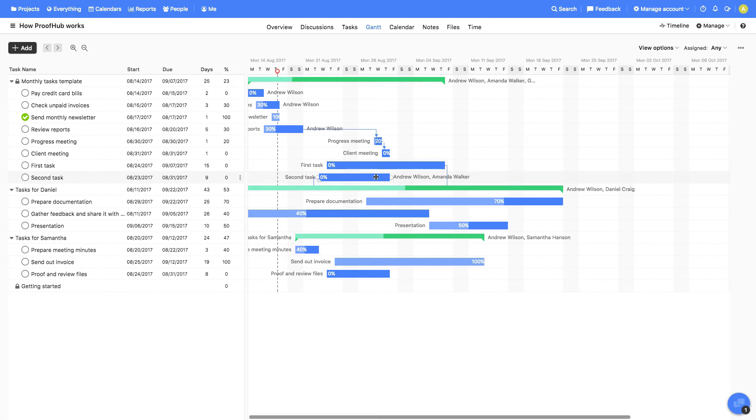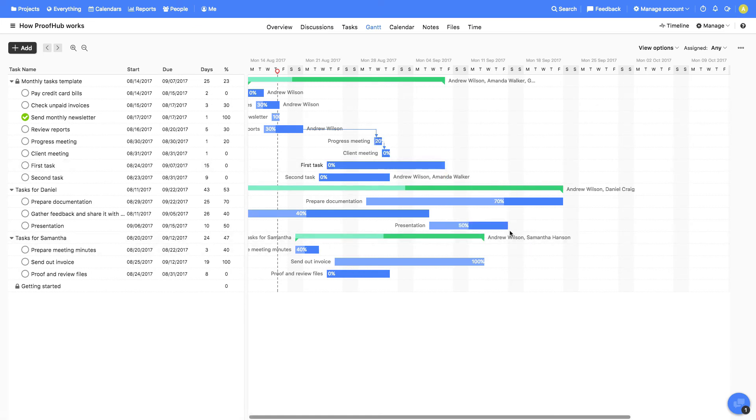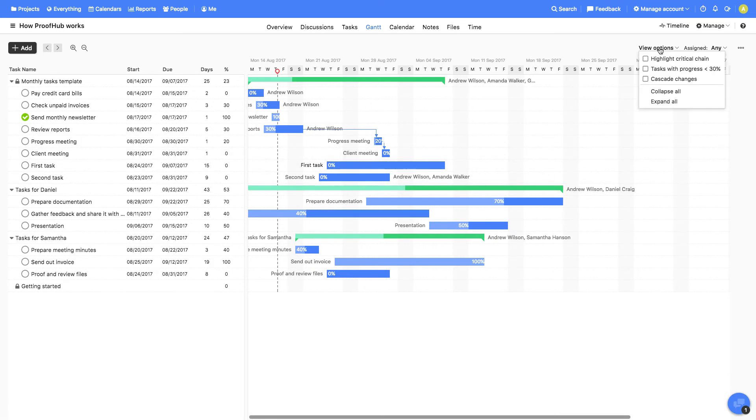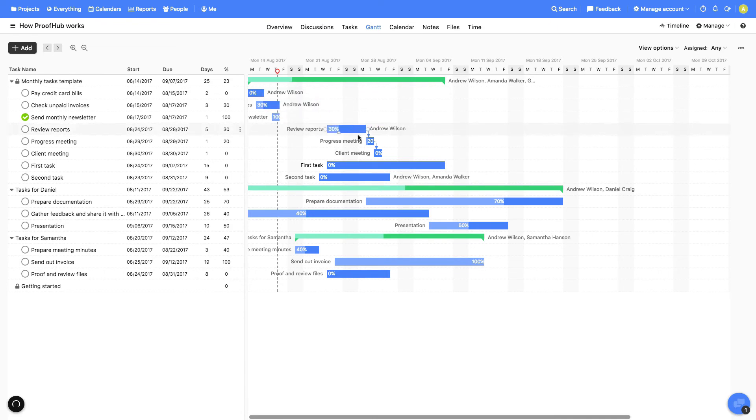To remove a dependency, right-click on the task and select the dependency to delete it. If we'd like the dependent task to move based on the main task, we can enable cascade changes from here. Now moving the main task will start affecting the start and due dates of the dependent tasks.